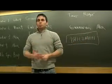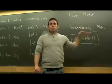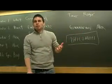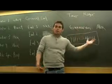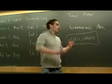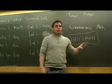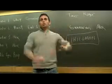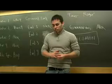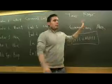Then there's the evaluation portion. Where did we plan to be? How far along the process did we intend to be at this point in time? And then the correction. If we are behind schedule, above cost, or did we lose a team member, whatever it is, how do we adjust, how do we get back on track and make sure that we are able to achieve our goals in the desired amount of time and inside the right budget. The monitoring and controlling cycle, like I said, takes place throughout the entirety of the project.